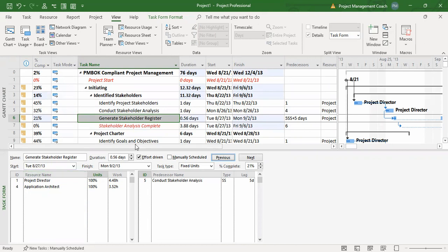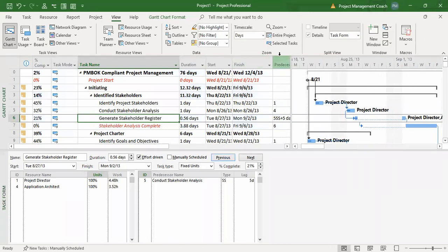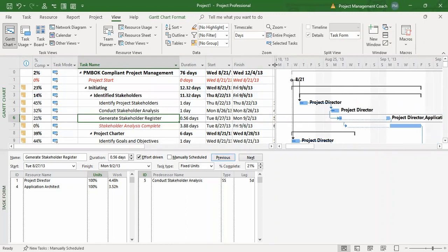So I'll say proceed with caution when you're using all these bells and whistles. You've got to have the project set up properly. I like using fixed duration because I don't like it messing around with my dates. I don't like it changing things on me. So I use fixed duration for the entire project. And I have an idea of how long it will take duration wise, but that's different from using effort-driven scheduling and deciding based on effort, based on the amount of people working, based on the amount of time they put in, here's how long the project will be.